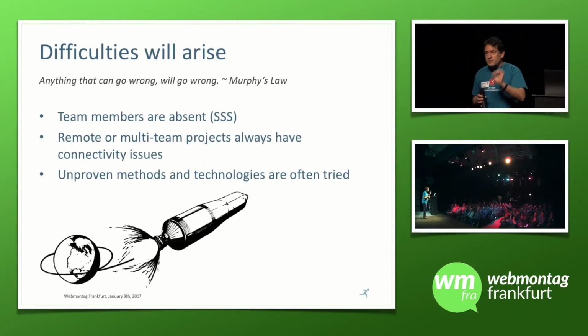You are going to lose, at the start of the project, plan 10% of your time will just disappear because people will get sick. I'm not talking about planned vacations. People will just disappear on you. Starting to turn the optimism into a little bit of pessimism. 10% of the time. Any time.